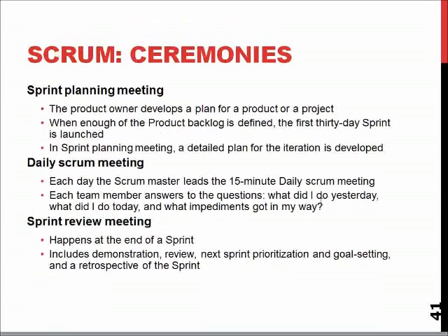And the ceremonies, of course, are more or less just a word for the different meetings and reviews and stuff like that. The planning meeting discusses the next iteration. The daily meeting is a 15-minute meeting at the start of the day where we talk about what we will be doing, and the review meeting is where we discuss what we achieved during this iteration.